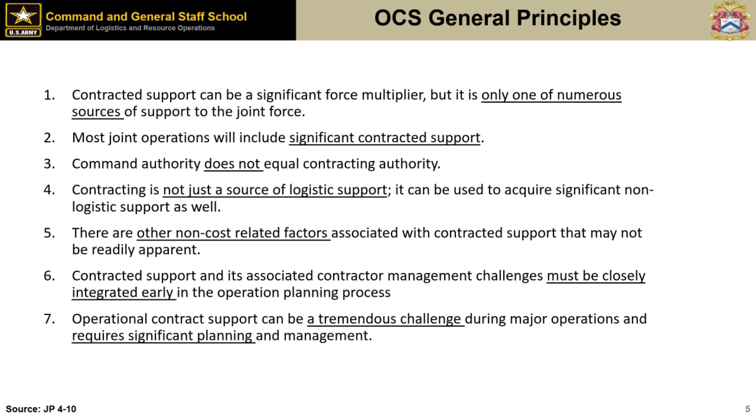Yeah, that's a great point about dependencies. While JJ is not an expert in signal or medical or any of those, he has that many contracts. He can tell you things like, do you want these guys to provide their own medical, or are you going to provide it? Do you want to feed them, or do you want them to feed themselves? Because a lot of things in contracts are consistent. He can give you a lot of advice on how you want to handle things that you just wouldn't think of. If you get an infantry platoon to provide security, you know you're going to feed them. You know how they're going to live. But with contractors, it's totally different. So that's a great point about dependencies.